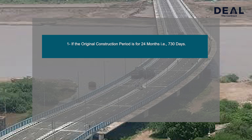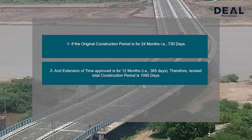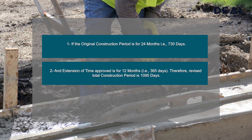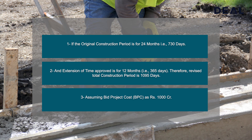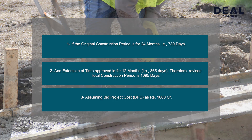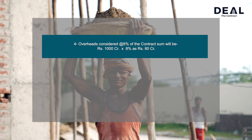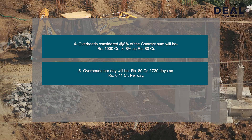If the original construction period is 24 months, i.e. 730 days, and the extension of time approved is 12 months, i.e. 365 days, the revised total construction period is 1,095 days. Assuming a bid project cost (BPC) of Rs. 1,000 crores, overheads considered at 8% of the contract sum will be Rs. 1,000 crores × 8% = Rs. 80 crores, i.e. Rs. 0.11 crores per day.